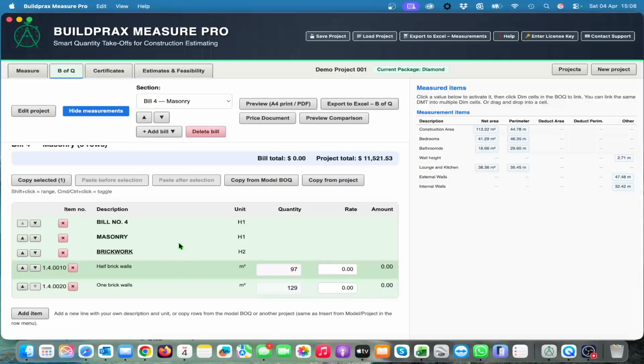project. So if you've got the same project, like a lot of shopping centers or a lot of hospitals or whatever, classrooms and schools, whatever you want, they've got the same type of building that they do. All those links will always be linked the same. So it will just save you a lot of time.